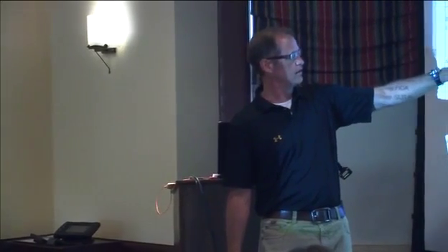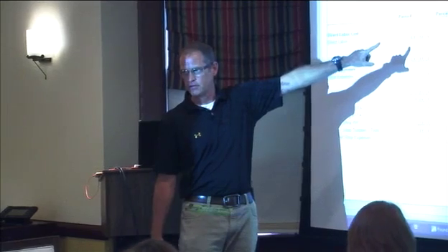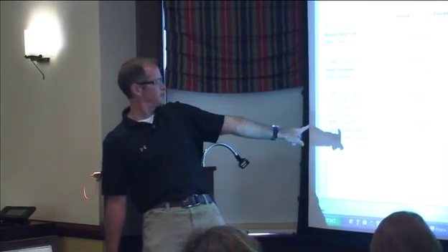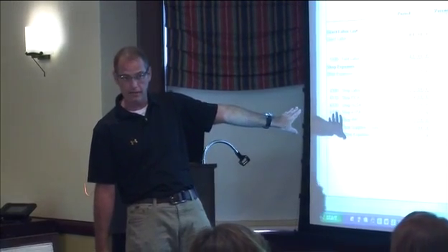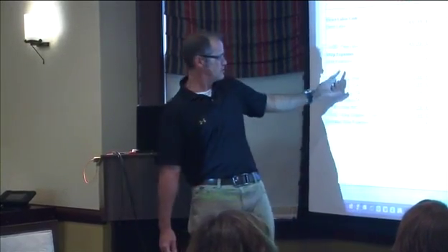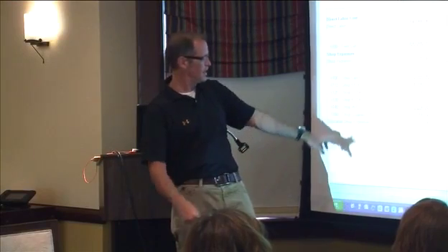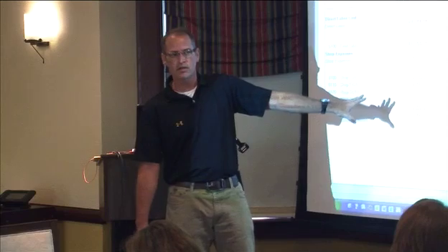Okay, guys, I want to illustrate something real quick. The question came up about the allocated or the indirect expenses. This is a real quick report, and it's just an example in my system with $1.4 million worth of direct labor expenses, right? And this is just my shop expenses here, but this could be any and all of my indirect expenses that I want to allocate to the jobs. Very simply, I've got $251,000 in my shop labor, shop FICA, FUTA, SUTA, workers' comp, shop supplies, tools, equipment expenses. All this can go in here.